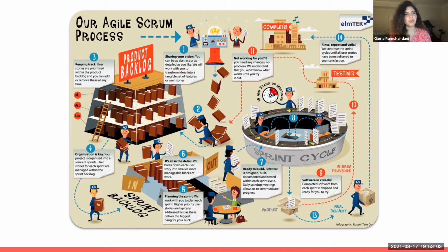You then move through the product backlog, prioritize your work, take it off of the backlog and move it into the sprint backlog, which you'll see here down in the bottom left-hand side. Once it moves from the sprint backlog, it then moves into the sprint cycle, where you have perhaps your daily stand-up meetings, perhaps you're following a specific Agile methodology, such as Scrum, XP, SAFe. And so once you've gone through your iterations or your sprint cycles, you then move your work out of there into a testing phase. Your work then gets tested. Is it completed? Do you have bugs?